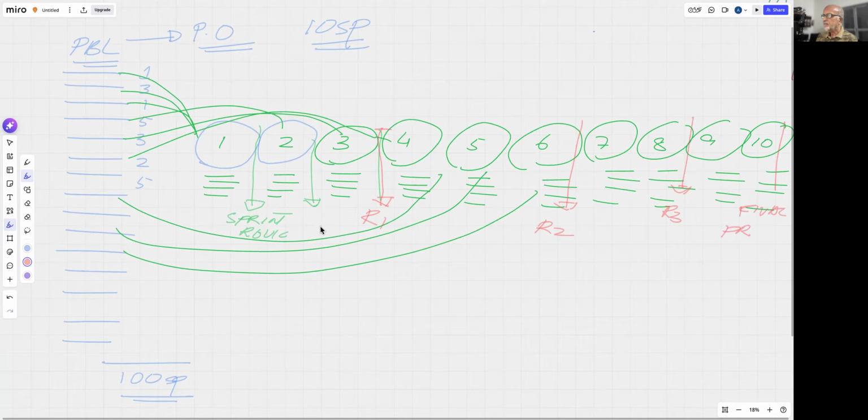So this is release 1, release 2, release 3, release 4. At the end of every sprint we have a sprint review, but some sprints will end up in a release. We call this a release sprint. In every release sprint, we deliver an increment of the product to the customer.